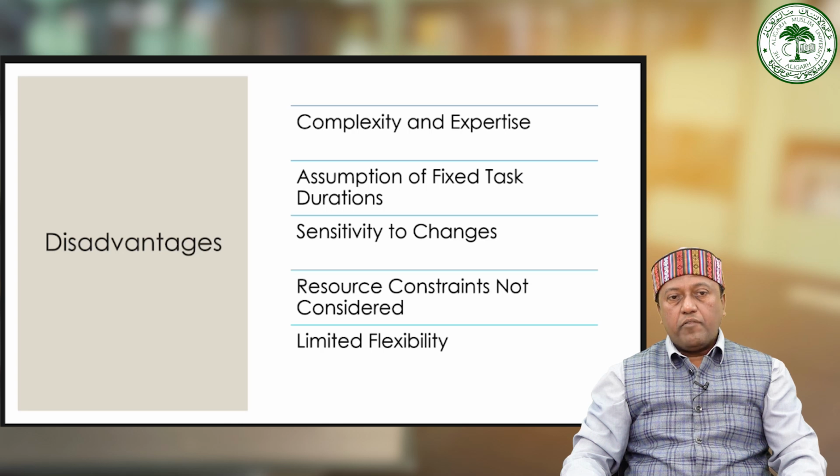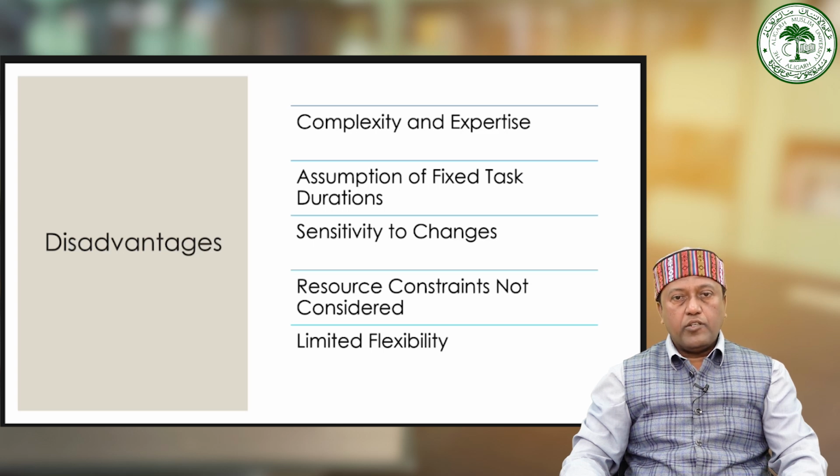Second, you can see the assumption of fixed task durations. So CPM basically assumes that the task durations are fixed and do not change over time. However, in reality, task durations may vary due to unforeseen circumstances or changes in project scope, leading to inaccuracies in project schedules.